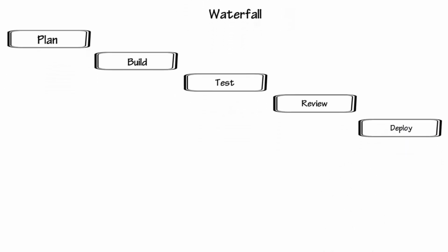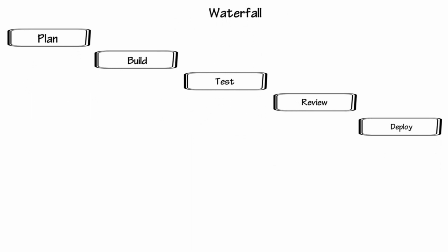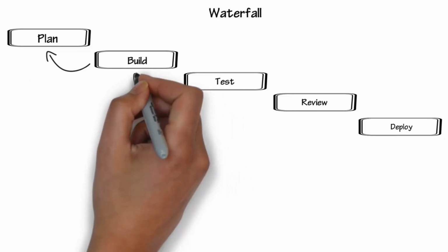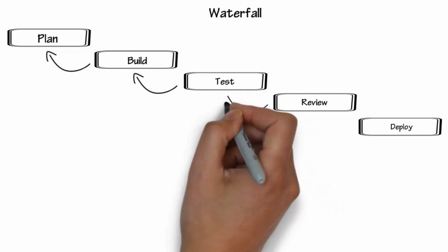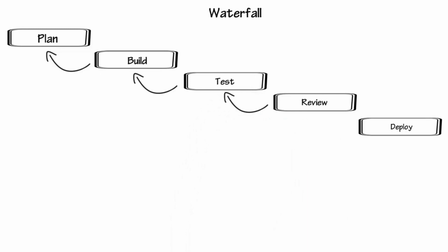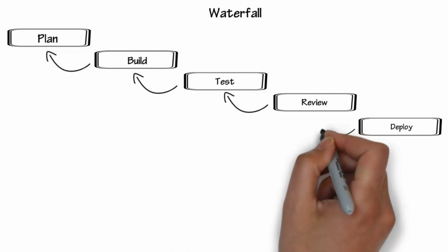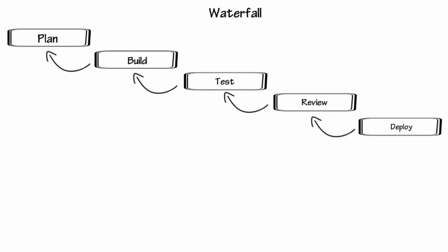First of all, the planning must be completed before any work begins, and in most cases the planning is done without entirely understanding the project. Once development is being done, oftentimes things get sent back to the planning phase, and the project either needs to start over or the developers are just criticized for not understanding the plan. This cycle can happen many times. When development is done building the product, it gets thrown over the fence to test, where when problems are encountered, it bounces back to development and sometimes back to planning. The same issues occur in the next few steps, with lots of backstepping and doing over. This can lead to lag times and many months to several years in order to get a product out the door.